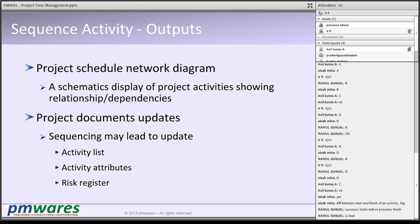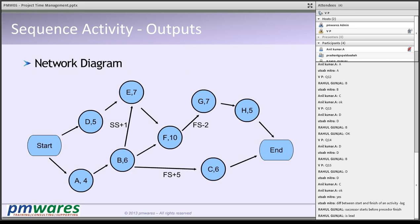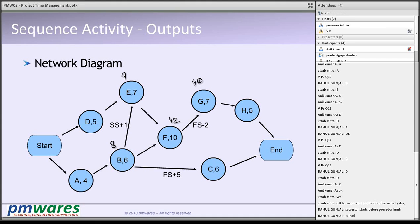Once you put leads and lags, the network diagram looks like this. For example, E depends on B with a start-to-start relationship and a one-day lag: if B starts on day 8, E starts on day 9. Here it is FS minus 2: if F finishes on day 42, G starts on day 40 — two days before F finishes. This is how the network diagram is structured.